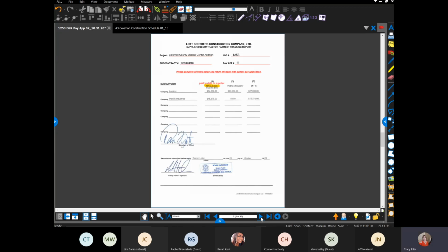This one is also something that a lot of people have a problem understanding, and this is just more or less a general estimate for us to be looking at when you guys are billing for material. Column B is the total paid to date to your suppliers, subs, rental companies, and so forth.